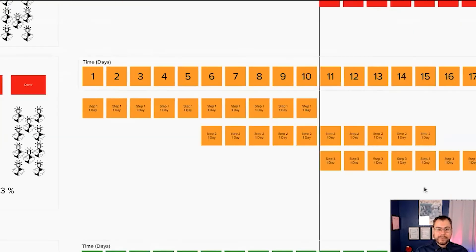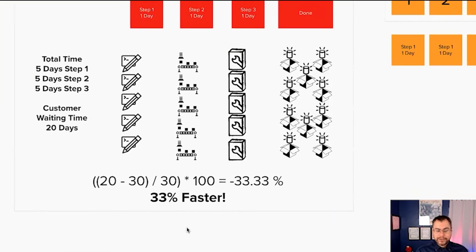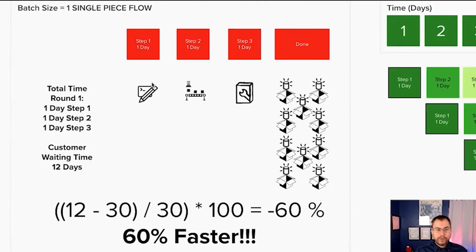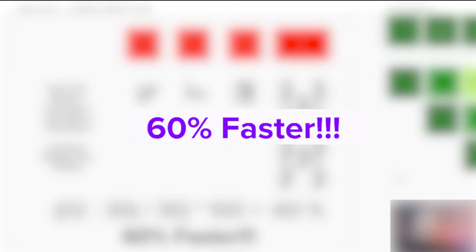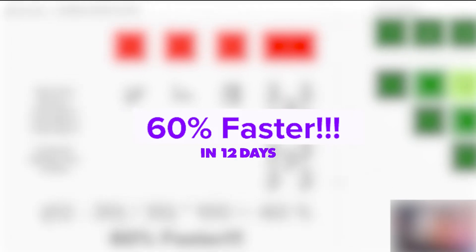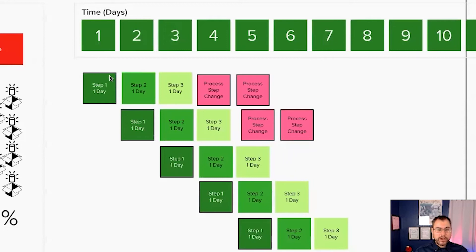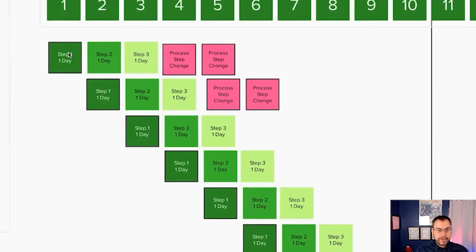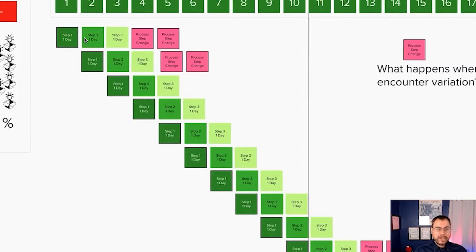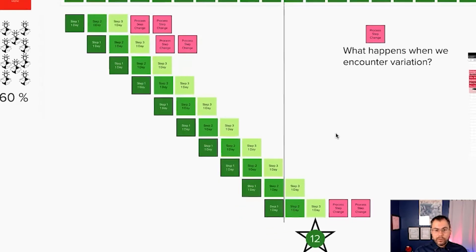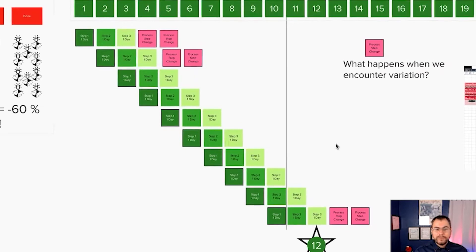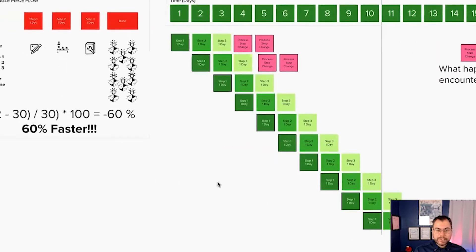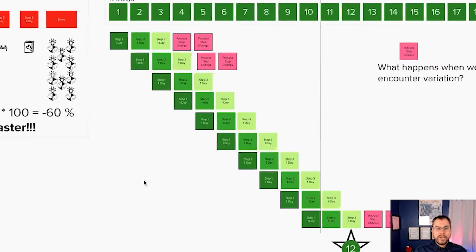But what if we tag this every day we work is a single day before we hand off to the next step. 60% faster in 12 days. What does it look like? Here we've got step one, step two, step three. They're handing off after each day. Step one team has uninterrupted flow. Day one, day two, day three, all the way to 10 days later. And they're handing off at the end of each day to the next step. So this customer receives the order 12 days later, 60% faster.